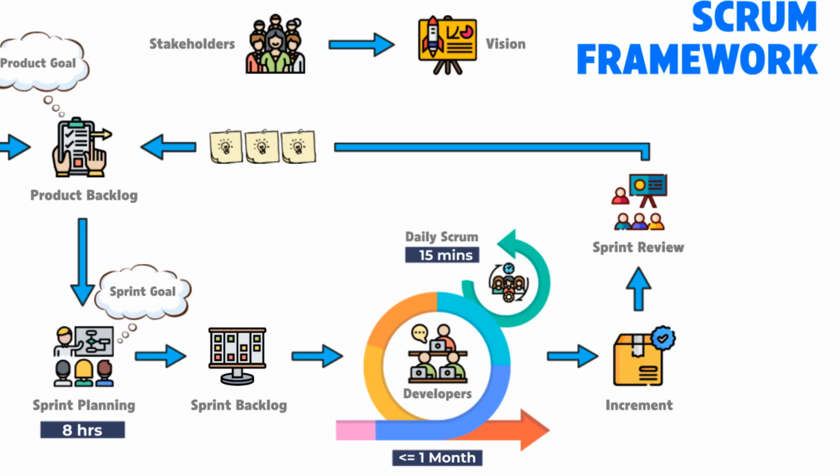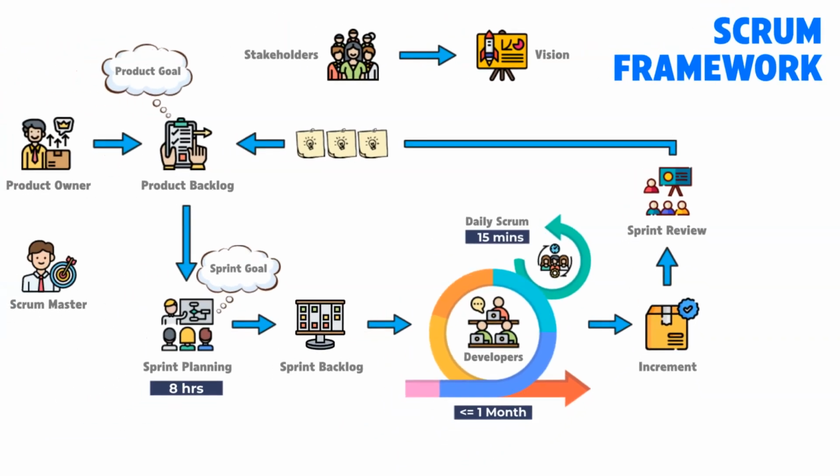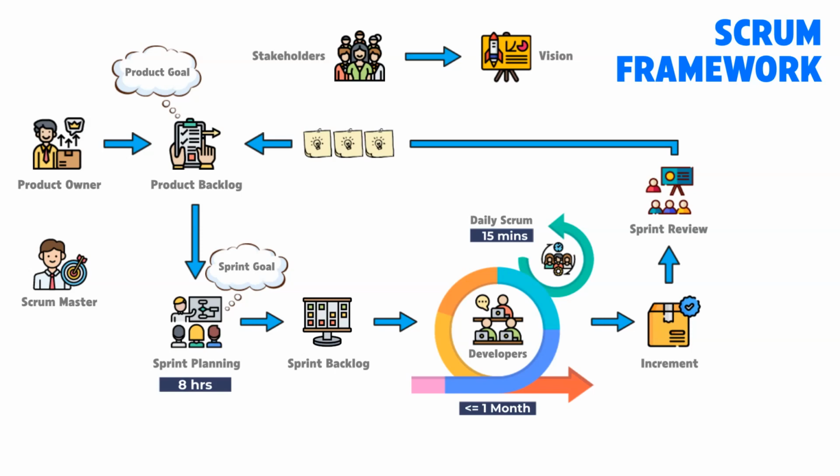A necessary discussion occurs between the stakeholders and the Scrum team to see what best can be done in future sprints, looking at the progress made so far towards the product goal. It may result in adapting the product roadmap. In a Scrum environment, the product backlog is the product roadmap.